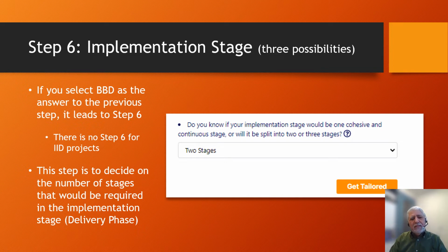Once the sponsor activated, the sponsor must assign someone with the position of project manager to start managing the project from the beginning. Of course, during the life of the project, the sponsor could change, the project manager could change, and many team members could change. But at least at the beginning, the sponsor will activate the project by naming a PM and saying activate. In that case, the project will come back to the designated project manager, and the project manager will be prompted to select the tailored method. So this whole tailored method selection process is happening at the very, very beginning of the project.